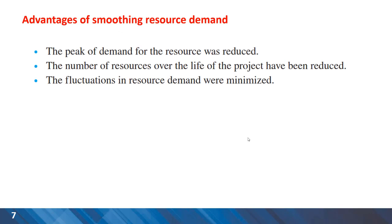Smoothing resource demand can have several advantages, including reducing the peak demand for resources and also the number of resources required over the life of the project. Also, fluctuations are minimized as a result of smoothing, and the process of seizing and releasing resources for equipment, as well as hiring and firing human resources, will be minimized.